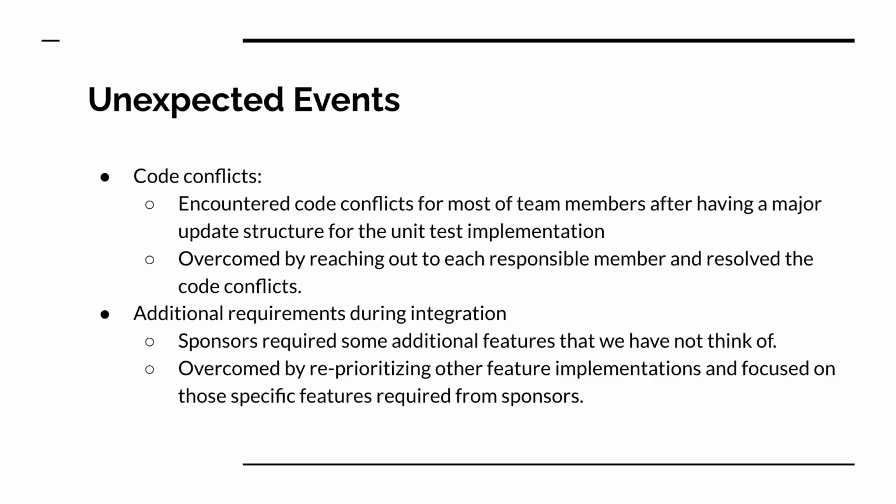Another unexpected event was additional requirements from the sponsors. They wanted some additional features that we had not thought of and that were not in our initial plan. We overcame that by reprioritizing all the feature implementations and focusing on the features requested by the sponsors.